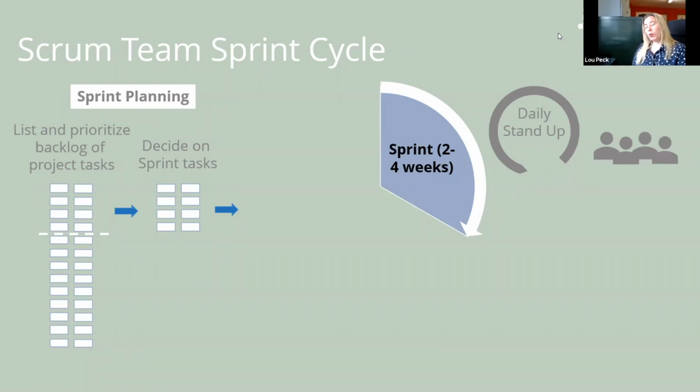Also, when you work with teams who are in locations all over the world, you could have 2 stand-ups a week. When you're dealing with Asia Pacific and America, because the time zones are so different, you could have Asia Pacific and Europe together in the first part of the week, and then the second instance that week could be EMEA and North America, Canada.